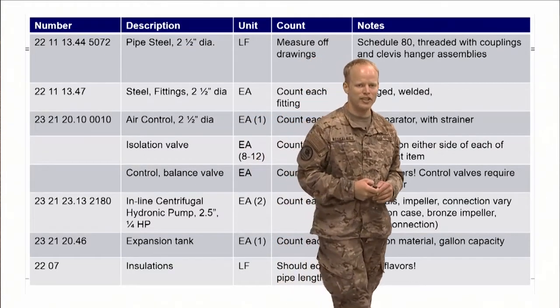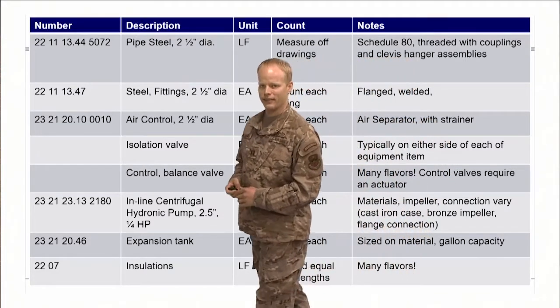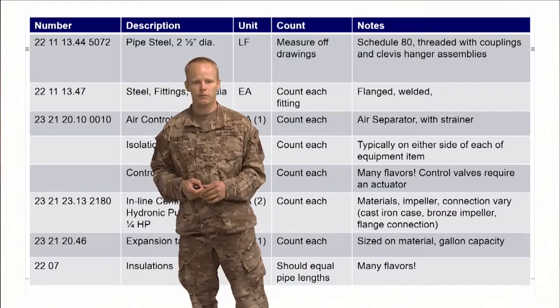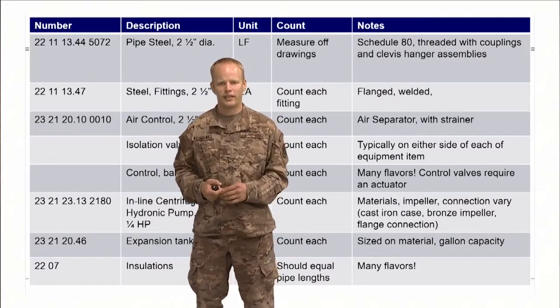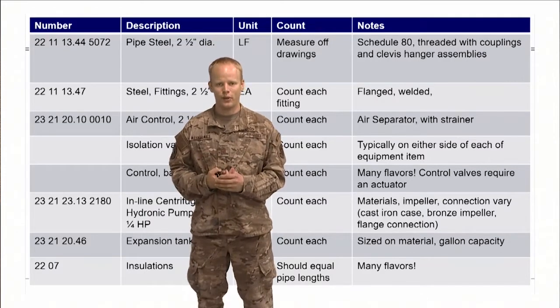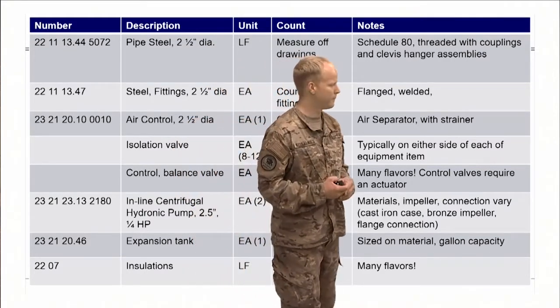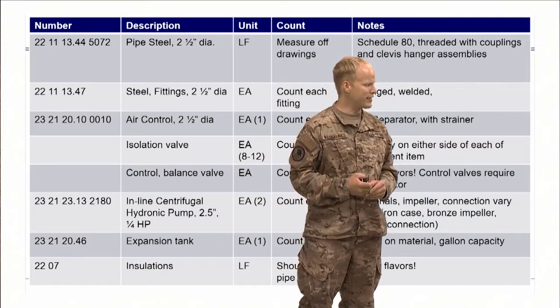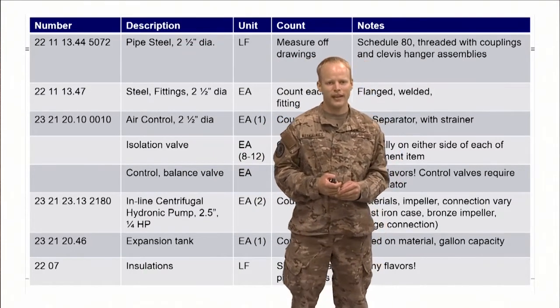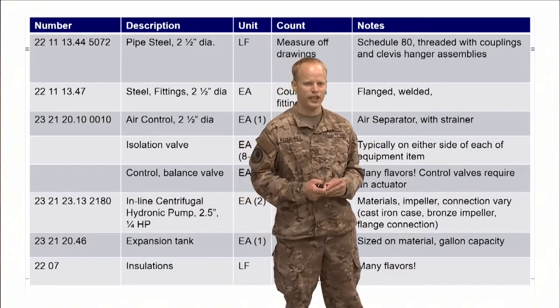So then expansion tanks, also sized based off of their gallon capacity. Sized on the material and the capacity of them, which again will be provided to you. Or if you're the design engineer, you'll know how to calculate that. And then the last thing that I have not talked about is you have insulation here. And that's going to be measured in linear feet.